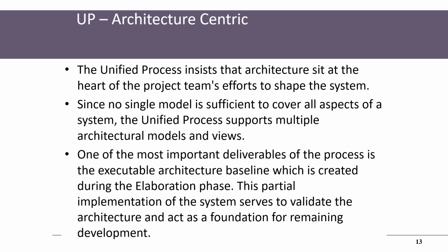One of the most important deliverables of the process is an executable architecture baseline, which is created during the elaboration phase. The partial implementation of the system serves to validate the architecture and acts as the foundation for remaining development. Well, architecture is something that should not be changed during the development, and this is why you need in a development team a senior person, a senior software architect.